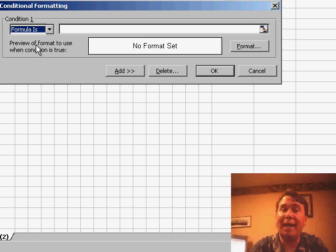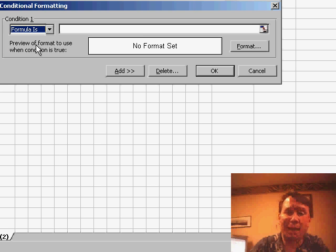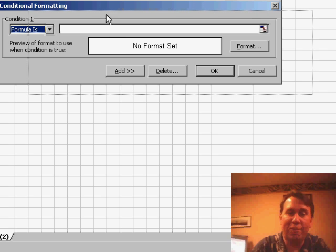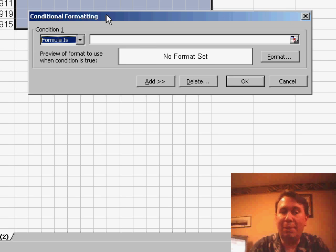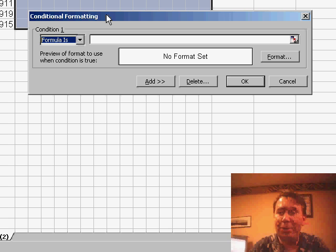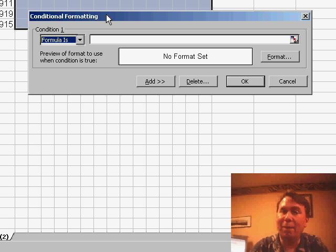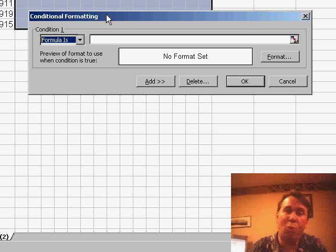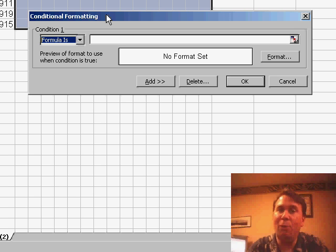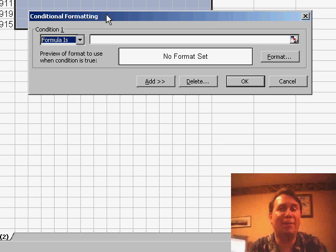Now I can write any formula that evaluates to True or False. It would be simple enough to write one formula to color the cells grey, but I'm actually going to create three different formulas. One to identify if this is the first year of the range, in which case I want the border to go along the left edge.